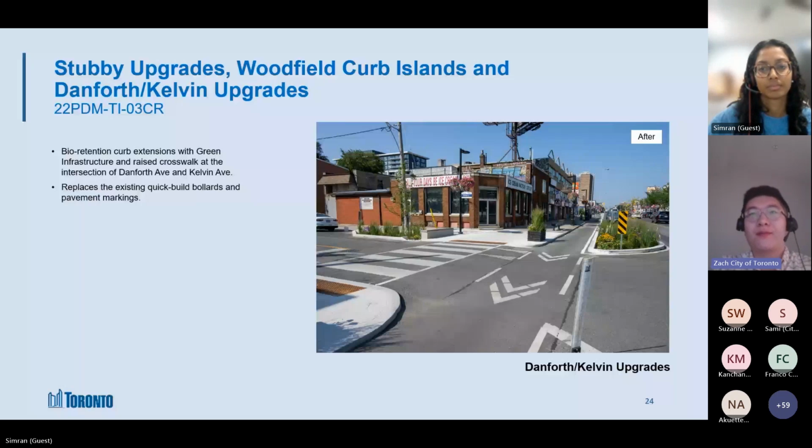And we found that that was a way of getting us better cost efficiency. And if we had to do things like change orders or item quantity overruns, it was easier and a lot more efficient to do it through an itemized contract. Next slide, please.